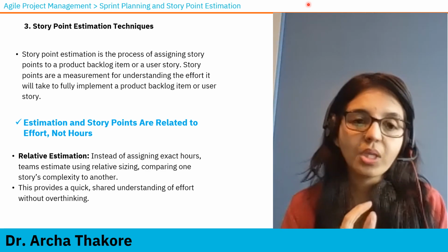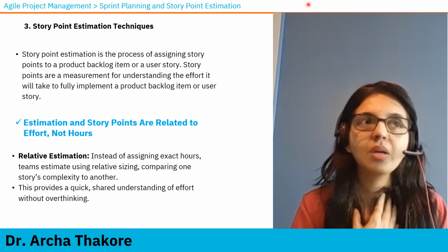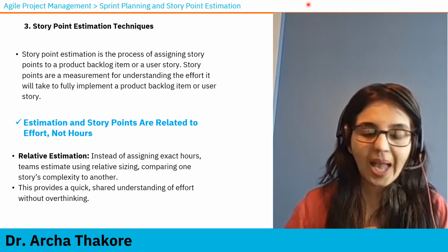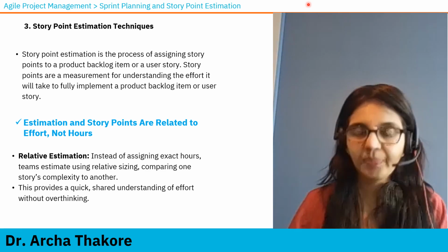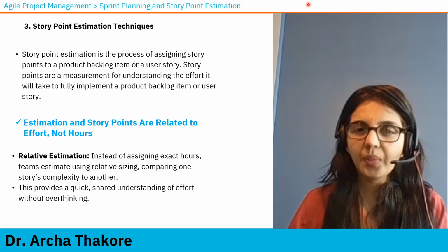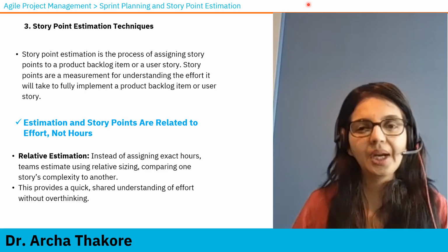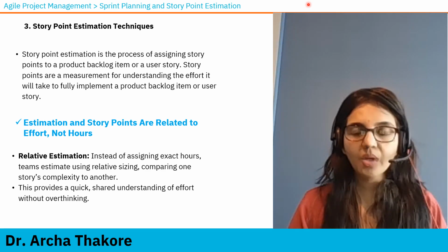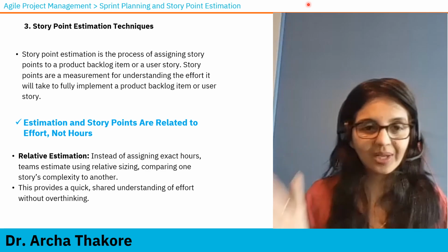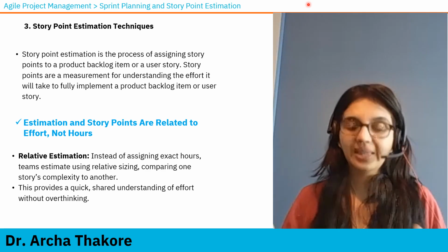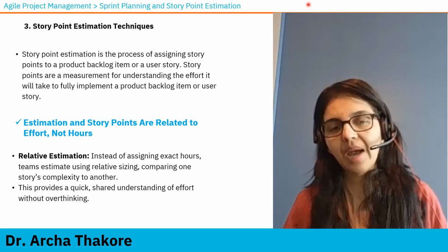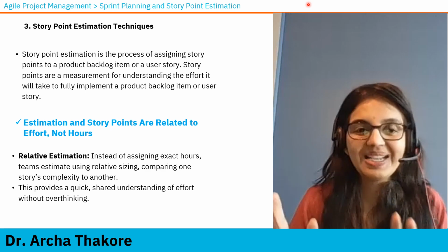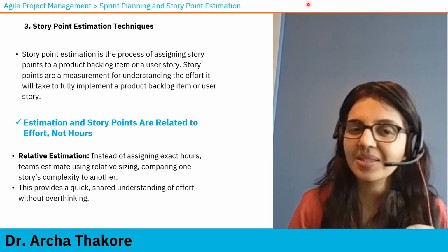Now there is a very important concept of relative estimation. Suppose you are moving into a new house. So you have packed all your items in boxes. Does the moving company, or if you are moving yourself, do you need to know the weight of each of the boxes? No. But you need to know small box, big box, large box. So relative to one another, their size, if you have this much information, you will be able to assess how much space it will take. I don't know if that example really fits into what we are talking about here, but it's a similar approach here.